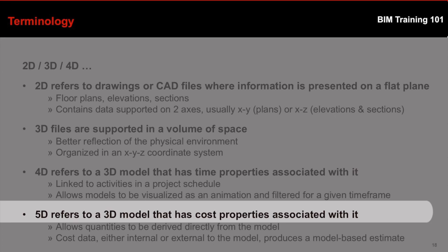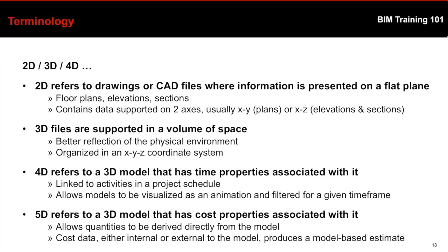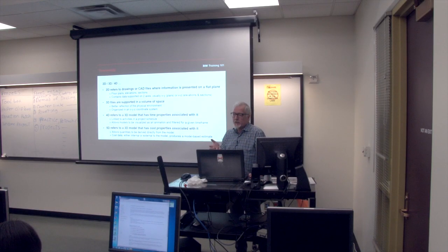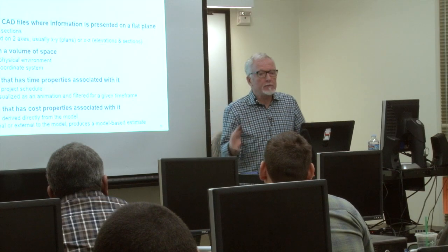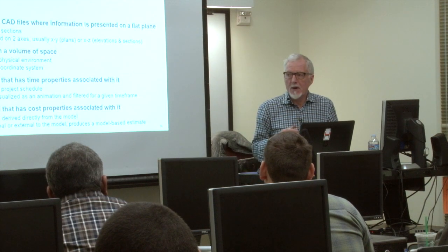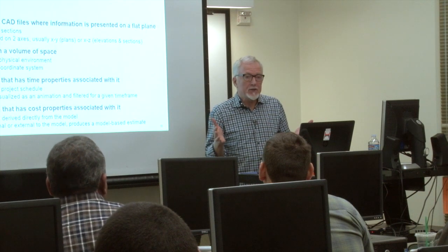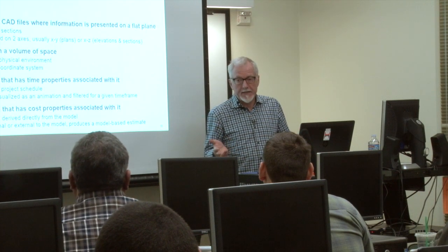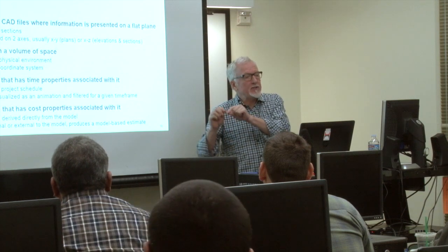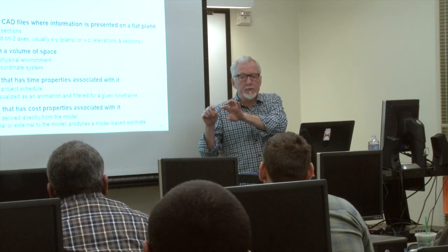5D is a 3D model that has cost associated with it. Now, that can be embedding the cost parameters like unit price into the model object, but more commonly we're extracting quantities from our model and importing those into our estimating environment. That's the more common way to do it, but you can do it either way. The bottom line is we can do things like figure out how many cubic yards of concrete are in our foundation and link that to our estimate where we would put our price per cubic yard in.